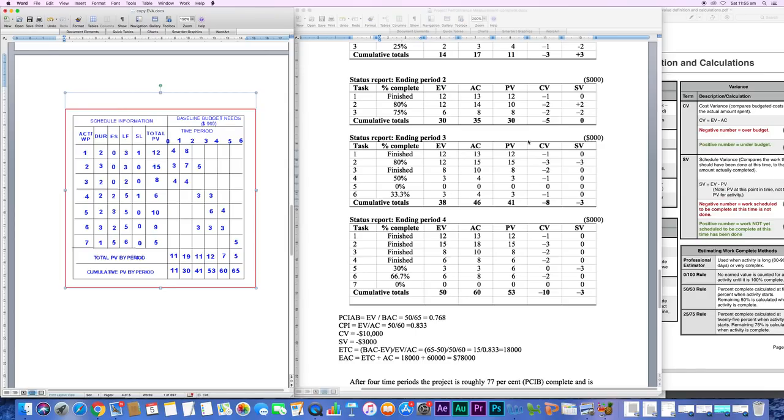And now you just calculate cost variance and schedule variance. Again, the same formulas here. Earned value minus actual cost, and schedule variance, earned value minus plan value. Look at here. We've got all negative numbers again, but now it's minus 8. Previously, we started with minus 3, we got to minus 4, now it's minus 8, so we're getting worse and worse in terms of cost. And schedule now is negative. We started with positive, then we got to 0, and now we are not doing well with both schedule and cost.